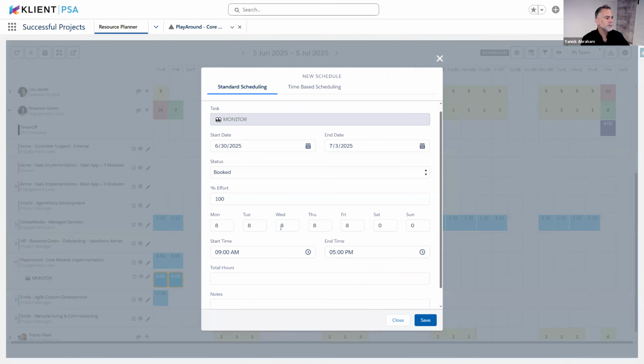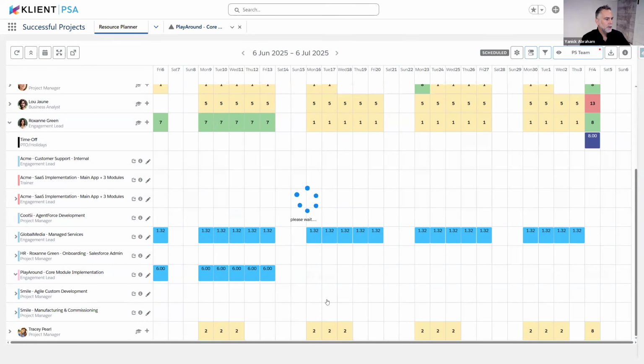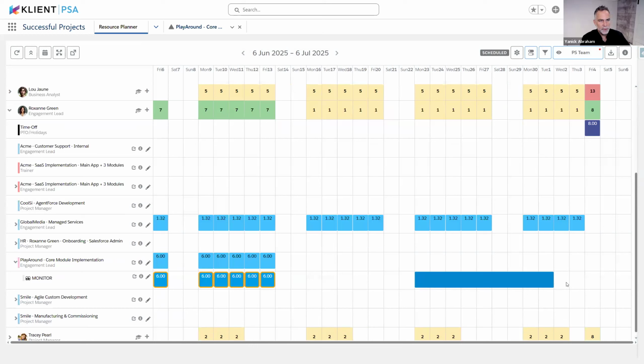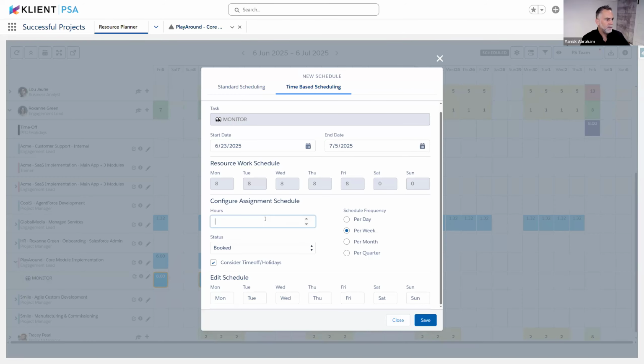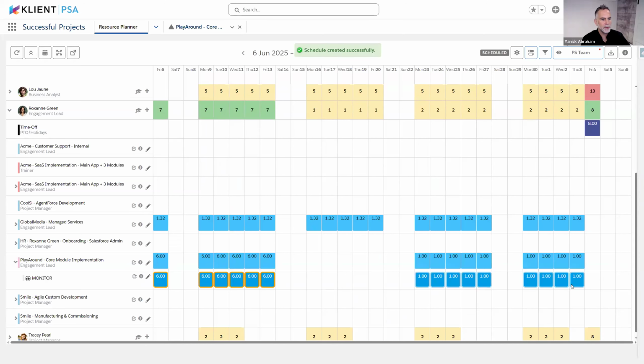I'm going to do another, actually, let me just go another week deeper. Let's say for those 2 weeks here, the scenario now is going to be 5 hours per week, not 30. And I want you to schedule 1 hour per day. So this schedule here will set the number of hours. For now, it needs to be the exact same amount, so 5. So now it's going to schedule 5 hours, 1 hour per day, for those 2 weeks in here.